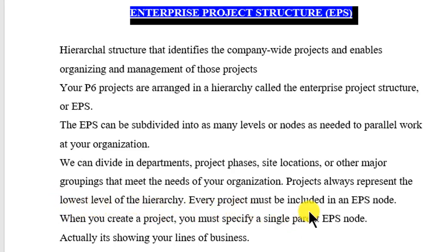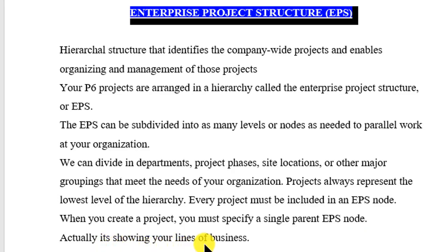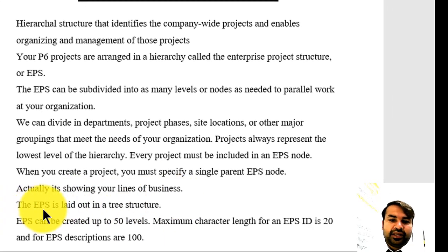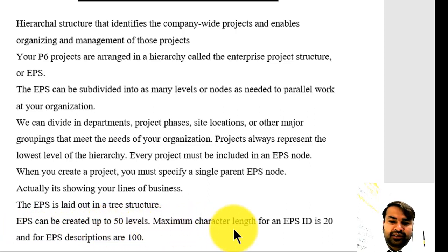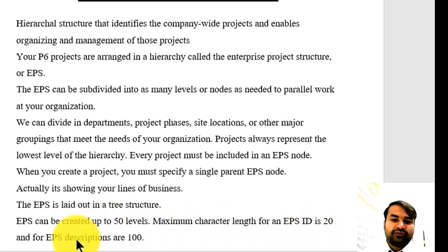Every project must be included in an EPS node. When you create a project, you must specify a single parent EPS node — it shows your line of business. The EPS is laid out in a tree structure and can be created up to 50 levels. The maximum character length for an EPS ID is 20, and for an EPS description it is 100.